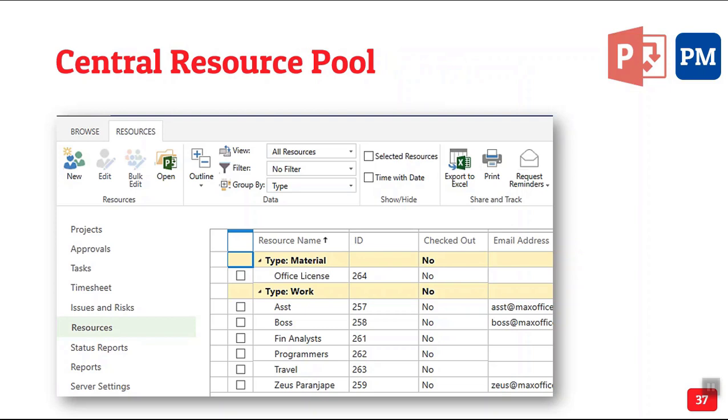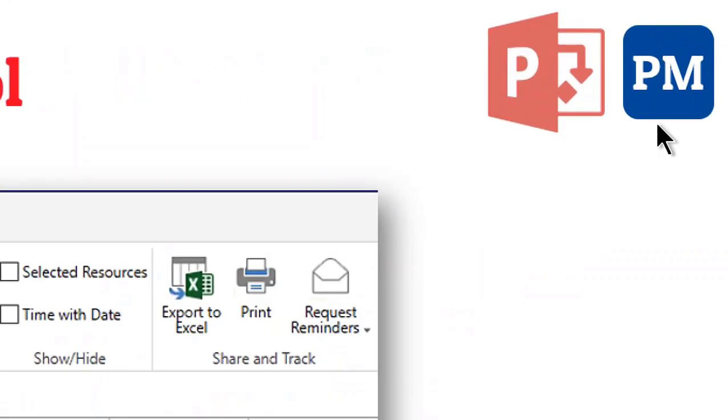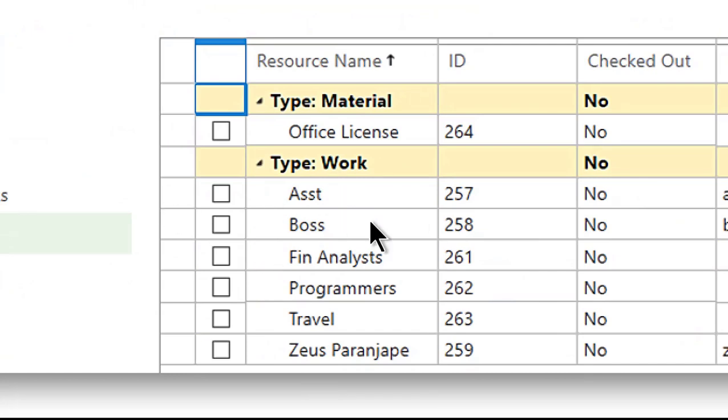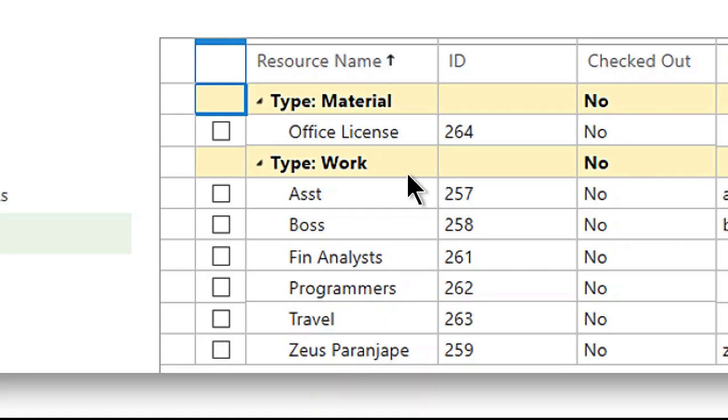Next step is to add people. Who is supposed to do what? Like Excel, we put the names of people, but these names cannot be arbitrarily put without knowing whether that person is going to go on leave three months later or is that person blocked later on at the same time by another project. So first thing we have to do is create a central pool of resources. I have created a sample list. Now these are actual people. Financial analysts and programmers are called generic resources because in early stage of planning, you don't know who exactly is going to be a part of the project. But you know, you need a mechanical engineer, you need a financial analyst, which one will be replaced later. So these are specific, these are generic.